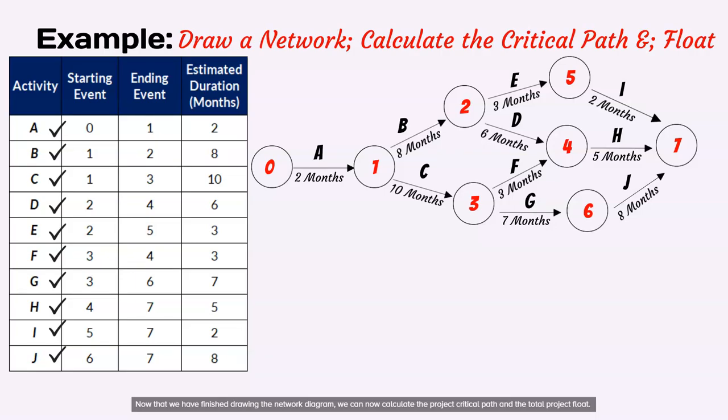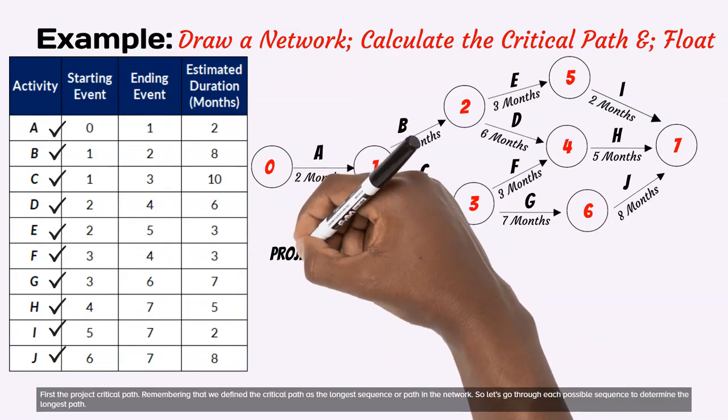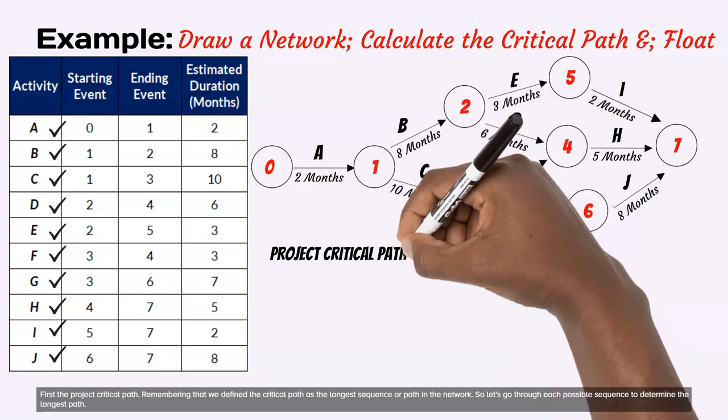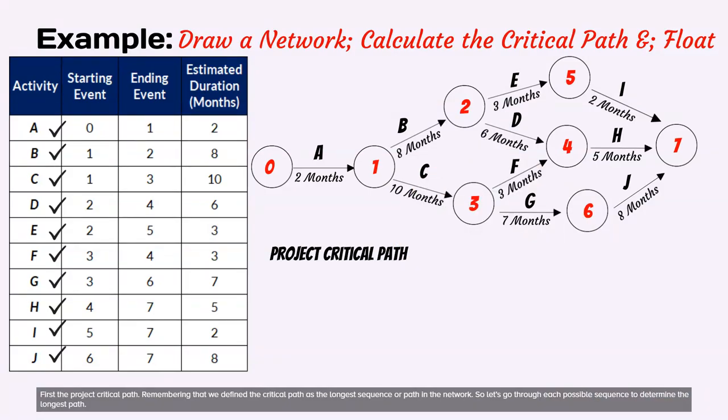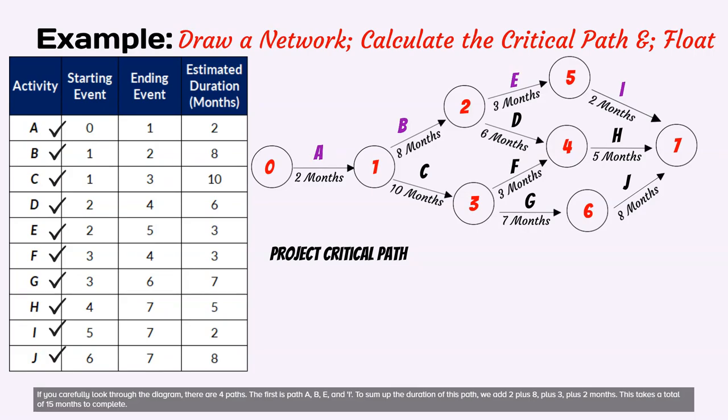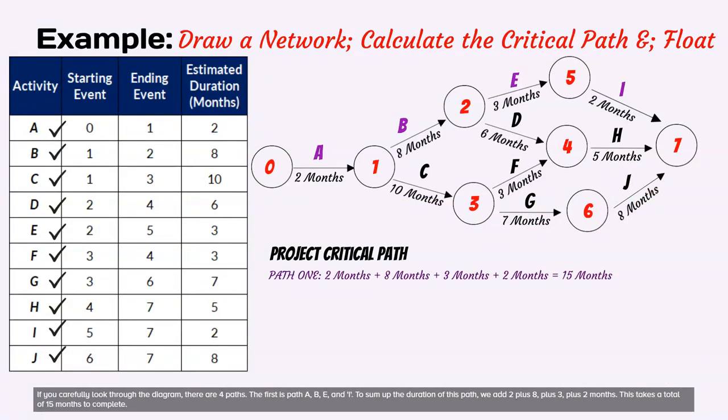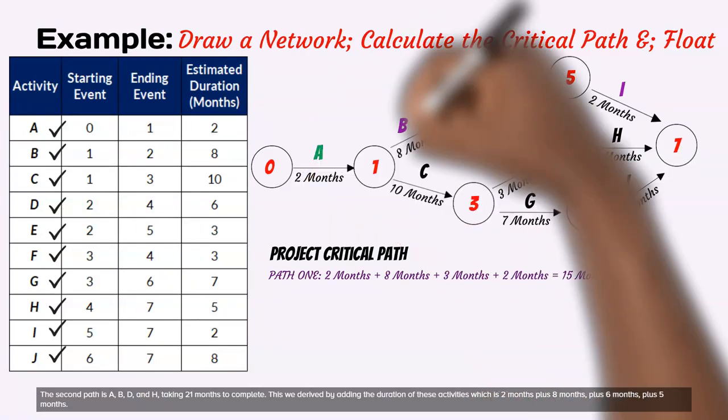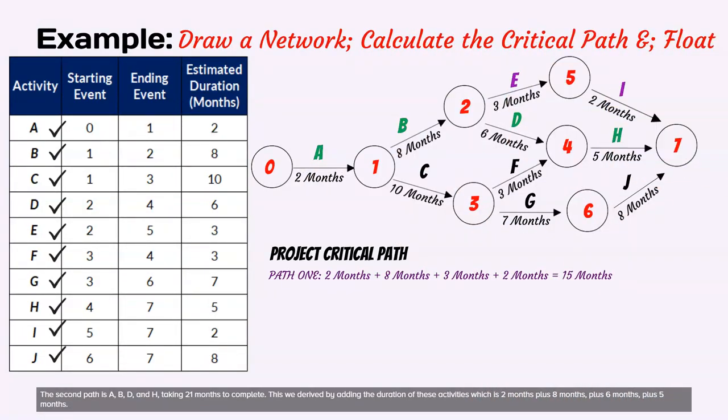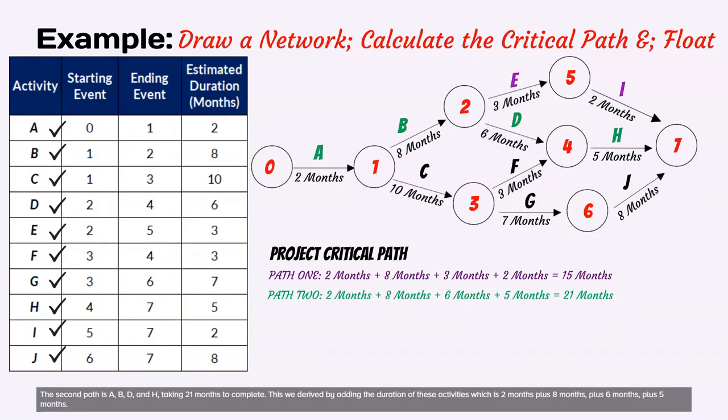First, the project critical path. Remembering that we defined the critical path as the longest sequence or path in the network. So let's go through each possible sequence to determine the longest path. If you carefully look through the diagram, there are 4 paths. The first is path A, B, E, and I. To sum up the duration of this path, we add 2 plus 8, plus 3, plus 2 months. This takes a total of 15 months to complete. The second path is A, B, D, and H, taking 21 months to complete. This we derived by adding the duration of these activities which is 2 months plus 8 months, plus 6 months, plus 5 months.